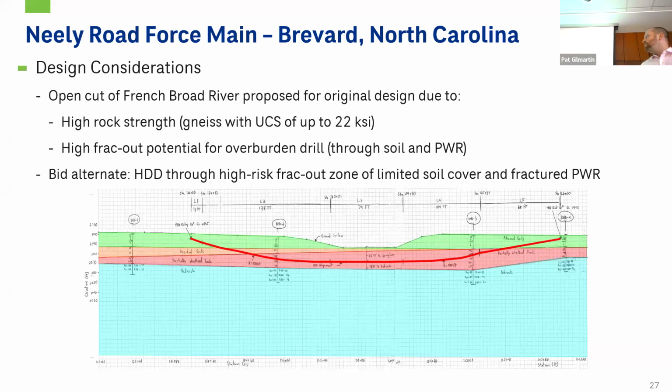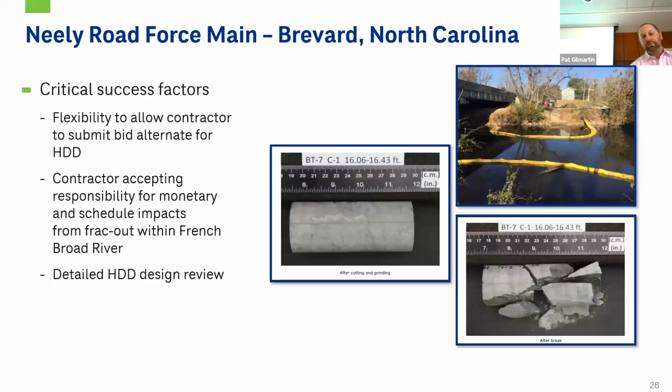And so for this one, the HDD ended up coming in much cheaper than the open cut, even with that guaranteed bore. And so that allowed us to take some of the risk out from the owner and ourselves with potential for change conditions and not being able to do the drill, but still allow the contractors to kind of push the envelope with things.